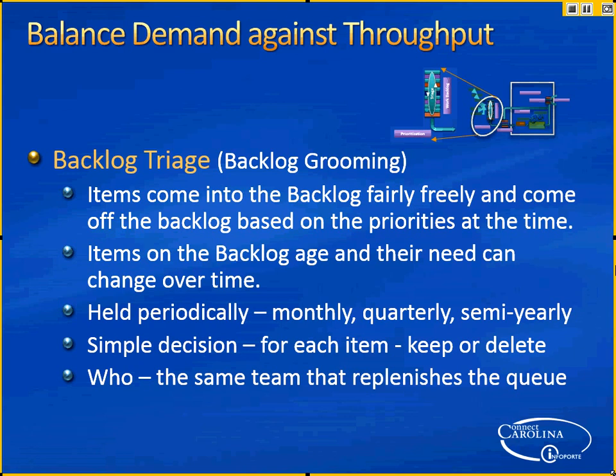So can I ask a dumb question? We talked a little bit earlier in the review that you're going to pull items out of the queue into the work in progress, essentially, right? Correct. So is the backlog the queue, or is the queue something after the backlog? The queue is something past the backlog. That's what I thought. So the backlog is really just sitting there, no priority. It would get pulled into the queue once it's a priority. It still may not get worked on yet, but at least the hopper can be looked at.